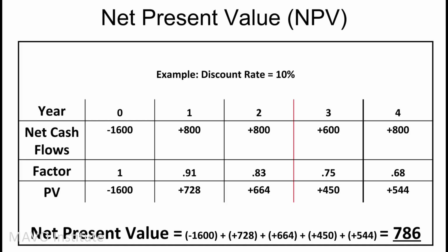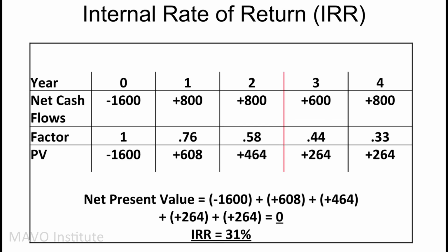The present values are added together to produce a sum of the present values. The initial investment is then subtracted from the sum of the present values. The result is a net present value. Ideally, the NPV should be greater than 0. An NPV of less than 0 indicates that the investment will actually result in a negative return on investment. The higher the project's NPV, the more desirable it is to undertake the project.